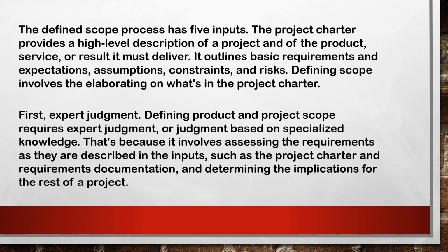The define scope process has five inputs. The project charter provides a high-level description of the project and the product or service that must be delivered. It outlines basic requirements and expectations, assumptions, constraints, and risks. Defining scope involves elaborating what's in the project charter.